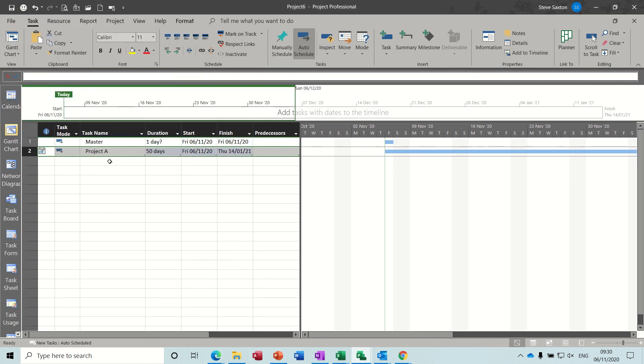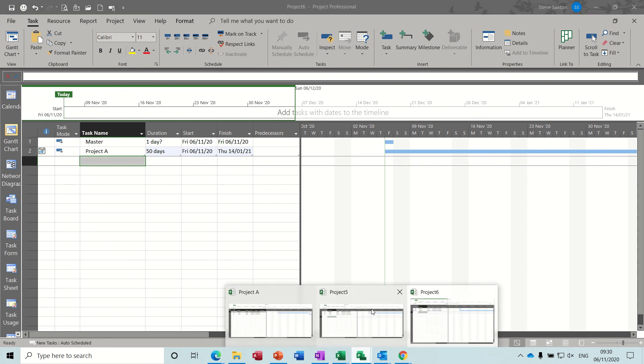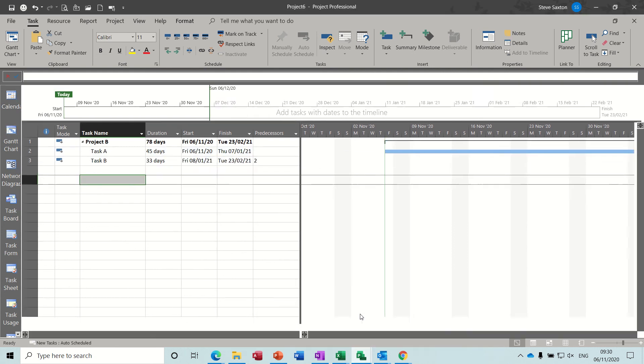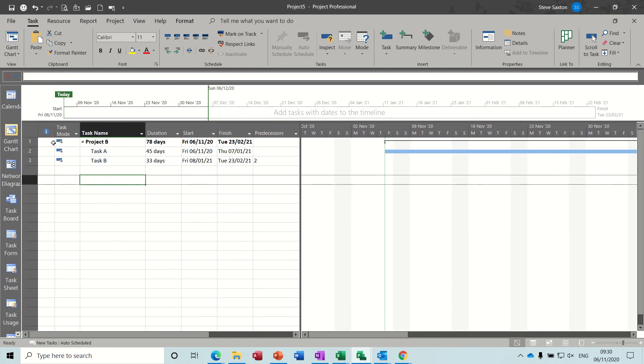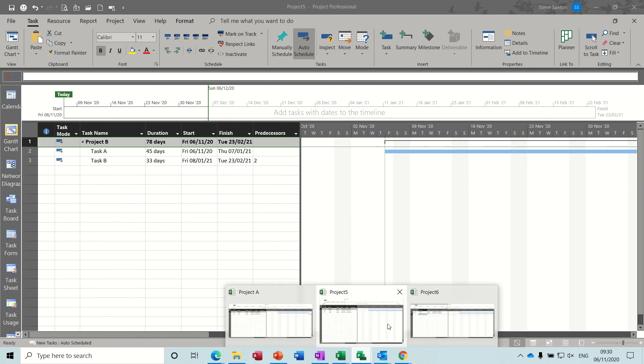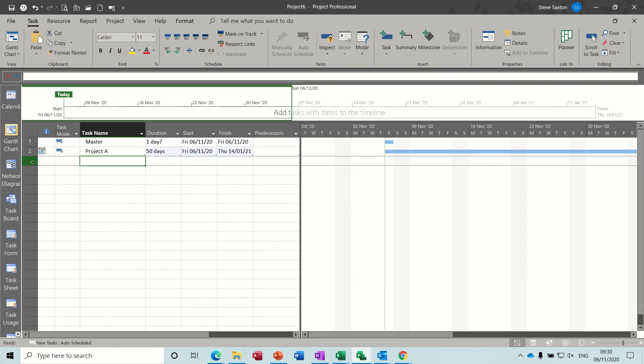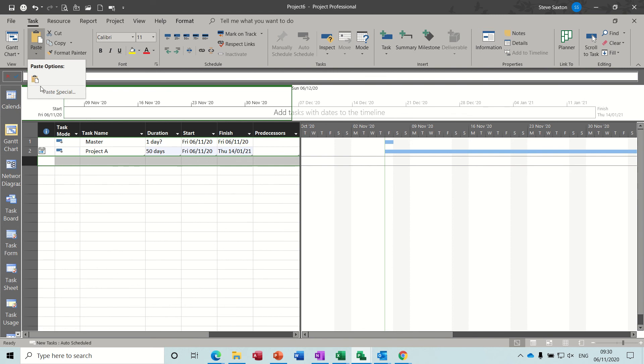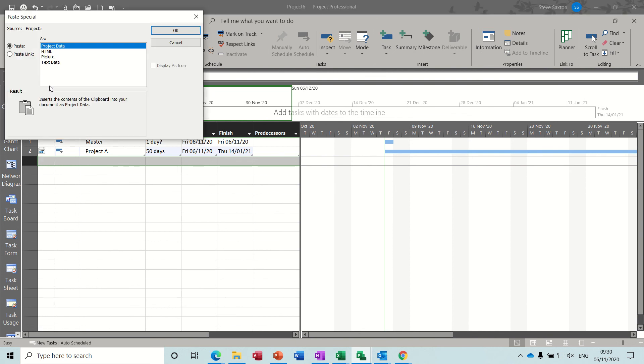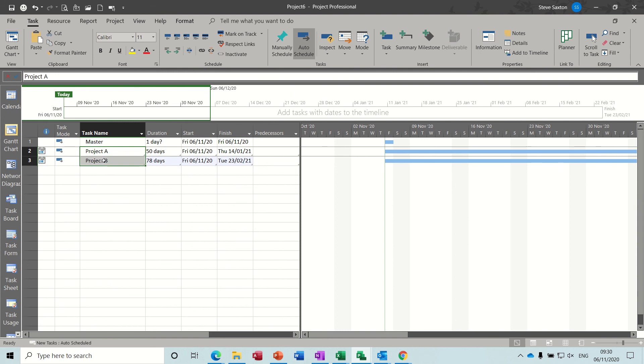And then you do the same for project B. Which I didn't name. Which is that one. Highlight the title. Copy. Come back over into the master file. Highlight the row. Use paste special. Paste link. OK. And then you indent those two.